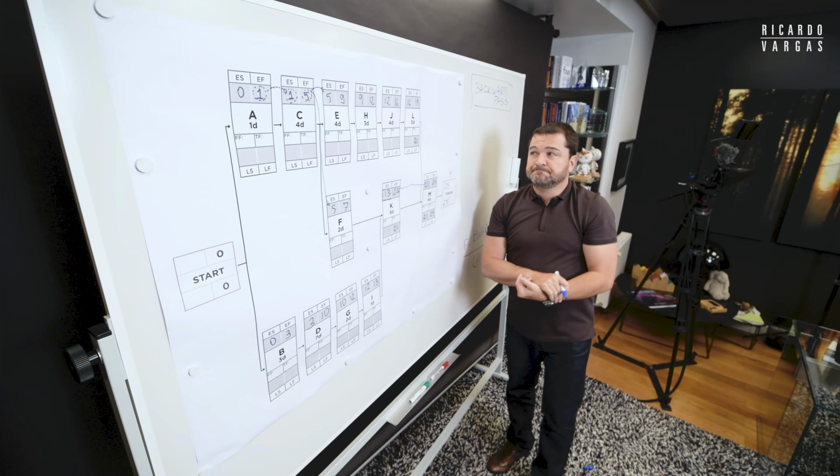Always remember this, because you are always trying to do things as late as possible. When you move from start to finish, as early as you can. When you go from finish to start, as late as you can. So between 11 and 7, which is the smallest one? It's 7. Right? 7 minus 4 is 3. 3 comes here. 3 minus 1, 2.